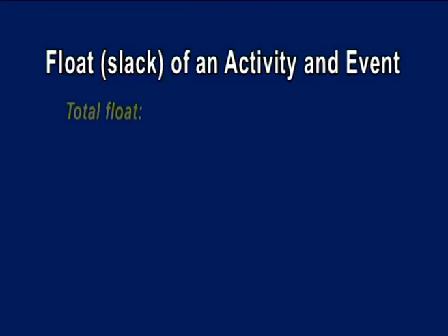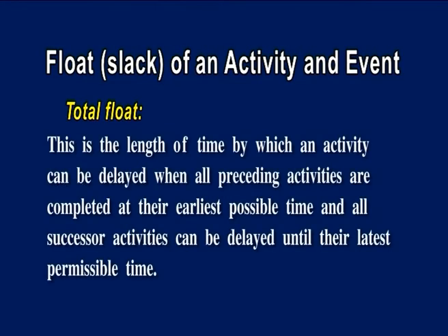The first is total float. This is the length of time by which an activity can be delayed when all preceding activities are completed at their earliest possible time and all the successor activities can be delayed until their latest permissible time.